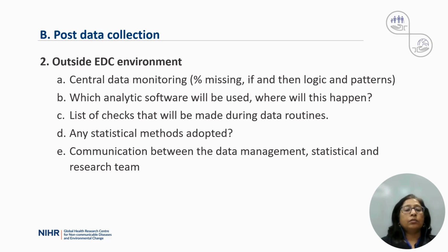You might also want to make a list of checks that will be made during data routines. Assume that you are doing a series of checks and you get a quality report, but you don't know what is being checked. You don't have a list, and the person has changed and you don't know what checking was done before. So it's always good to have a list of checks which are being made during data routines, which can be updated routinely.